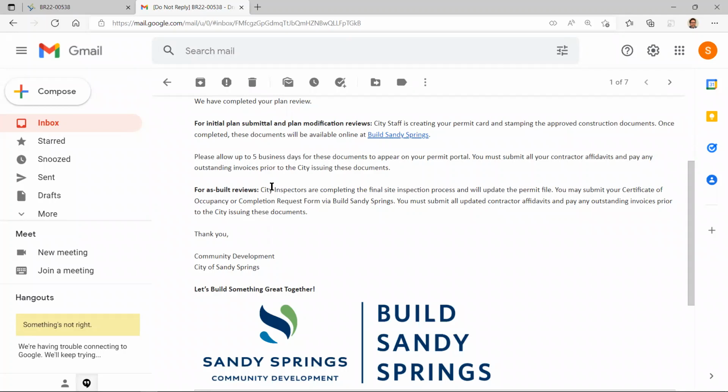I don't like having a narrative summary of a problem, because that doesn't tell me where the problem is on my 50-page set of drawings. You know, I'm a structural engineer, so I'm used to somebody going on that sheet and circling and saying, you need to fix this one. Because it could just be a typo on one page. And like I said, I've literally had architects go in there and try to fix something that was not broken because they didn't know which sheet it was, right?